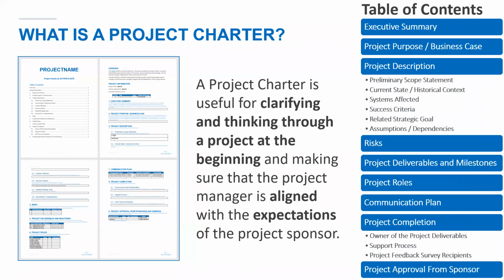And so we ran through the project charter in like an hour and 10 minutes, because all we're doing is getting a team together to put together what our strategy is going to be. It doesn't need to be that much bigger. So going through a project charter also helps you determine the appropriate scope for this thing. It doesn't make sense for us to start doing any BI until we have our strategy and vision, and we get Frank, the new data guy, in, and we can figure those things out. So we used it to make the project simpler, and it wasn't as complex. And that helped too.